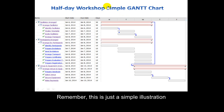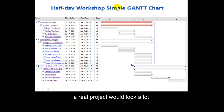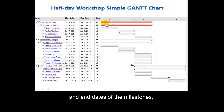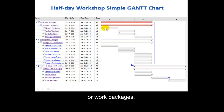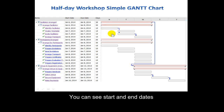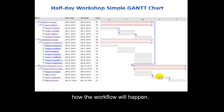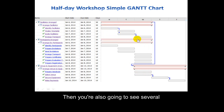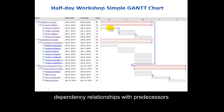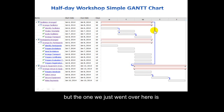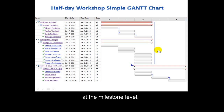Remember, this is just a simple illustration — a real project would look a lot more complex. You'll see the bars that represent the start and end dates of the milestones, high-level activities or work packages, and tasks, giving you a good picture of how the workflow will happen. You'll also see several dependency relationships with predecessors and successors — most at the task level, but the one we just reviewed is at the milestone level.